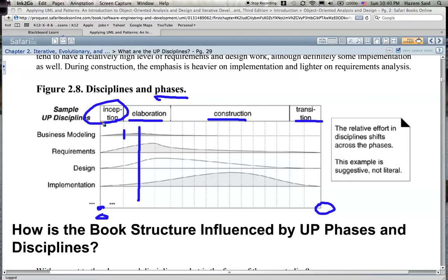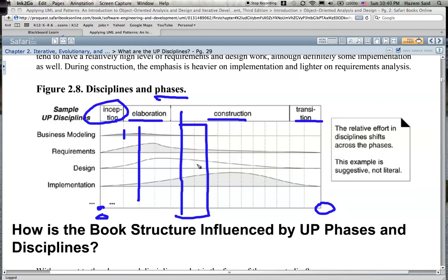The inception phase, as the name suggests, is where you launch the project. This is where you spend time on the domain, estimate the time, and decide what your iterations will look like. An iteration is a vertical slice in time — you take all of these activities together for a period, say two or three weeks. That is what you do in inception.